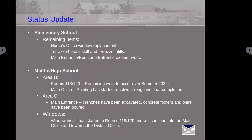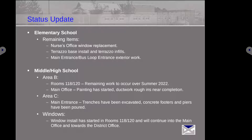Area C is the main entrance. Trenches have been excavated, concrete forms poured, footers done, and steel is going in next week in that area, so we're moving swiftly along.